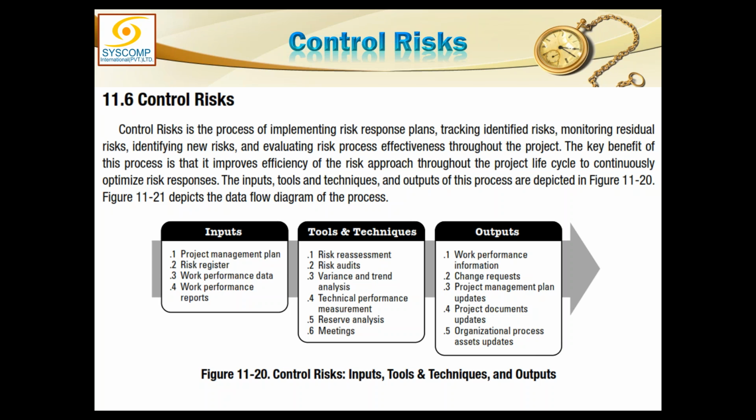And once the risk response plan has been invoked, we will again analyze the residual risk, whether the risk has been treated effectively or not, and what is the risk which is left. So whatever is left is called residual risk.